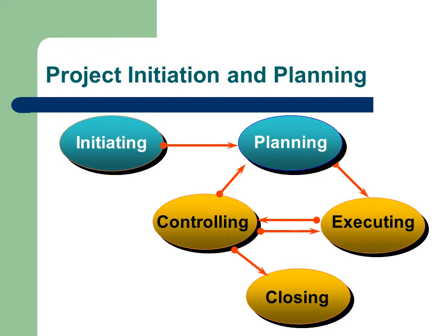Because the complexity of the project and the delivery options are often not uncovered until the planning stage, the project sponsor will often give approval for seed funding, which covers only the planning phase. At the end of the planning phase, the viability of the project will be re-evaluated together with a more detailed scope and more accurate estimates of time and cost. At this approval point, often called a stage gate, funding for the rest of the project will be approved if the project sponsor believes it should still go ahead.